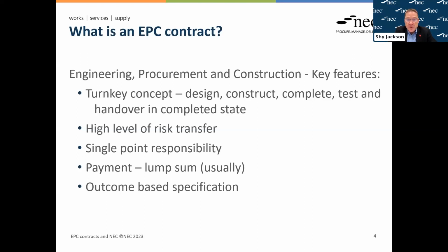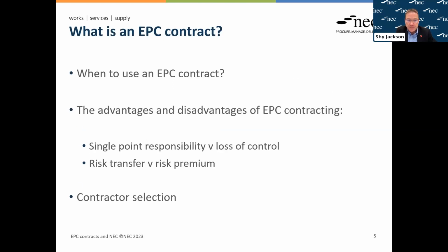Such projects usually involve some complex processing. The ultimate goal is usually generating revenue, so the success of the project very much depends on being able to start commercial operations. It also means that the design obligation is based less on what we see as a traditional specification and will usually include fitness for purpose obligations. So if we move to the next slide,